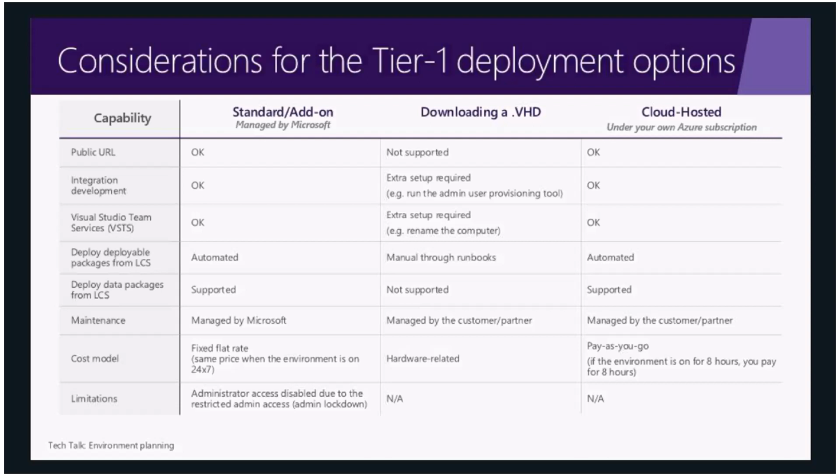So one key exercise that still applies when you're preparing your rollout is to do an assessment of the network in your store. So the local equipment and also the connectivity from the POS device to the different data centers you can consider in Azure.